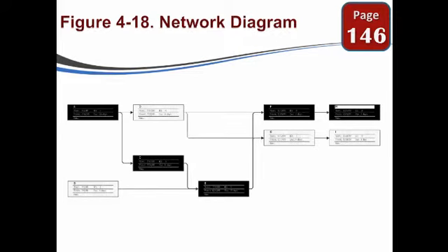So under the Views tab, you can actually see the network diagram. This one's not in color, but you'll notice that the black blocks actually represent the critical path, so not everything is on the critical path. Not everything is determinative in this particular case. So let's talk about the network diagram.